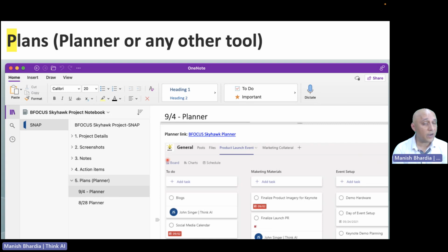We may have to talk to the client about pausing the project, getting more money, moving resources, or getting more resources. Whatever it is, management needs to be involved here. So we take a screenshot of the plan wherever it's done, and we know these are the timelines, and we do not let it go beyond that.